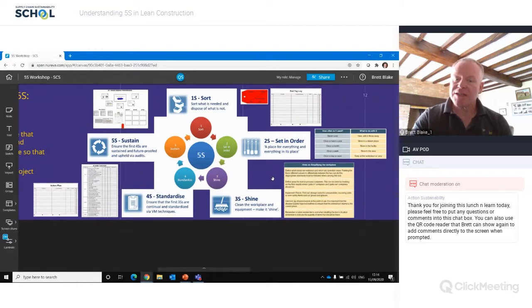The standardise, this is something that could keep on improving. So as you go through the 5S, this iterative process, you will find further opportunities for improvement. So it's important that you keep your check sheets and your standards updated. And this will be identified through the 5S sustain, which will help do the check act to ensure what we have in place is working for us.